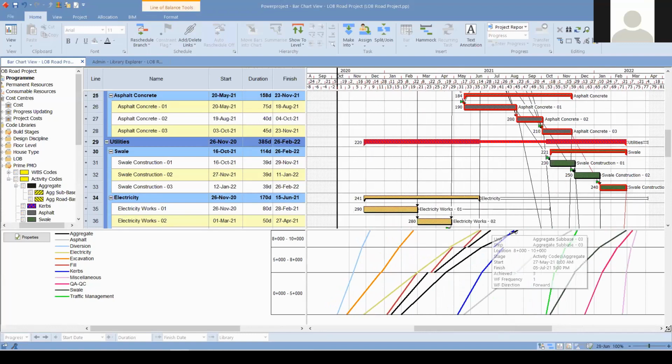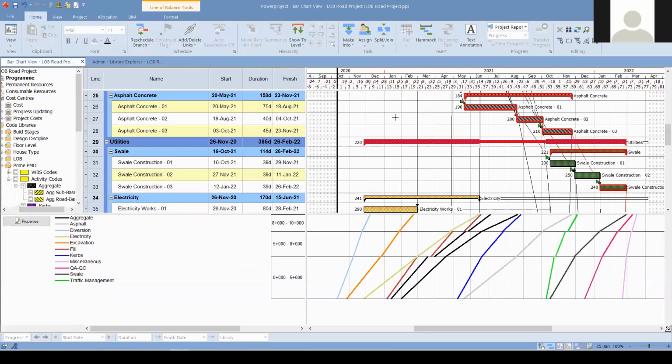As you see, if this is collapsing, we are making sure that on the same location and at the same time, these crews or these activities should be executed in the most optimal time. These are repetitive activities, so it can be a road project, a pipeline project, or a high-rise building, where all the wall installations and reinforced concrete works repeat each other on different levels. So we need to make sure that these are all generated in the most optimal way.